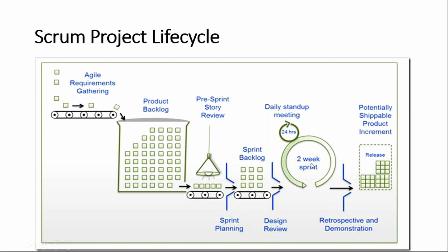Agile says a sprint duration can be 1 to 4 weeks, but as of now I have not seen any team working on a 1-week sprint. The reason is that 1 week is too short: in that you also have to do the planning, the retro and the testing. At the same time, 4 weeks is too long.